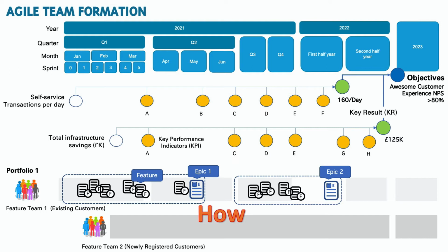With a draft feature roadmap defined, their attention then focuses on establishing a series of key performance indicators. These are shown as letters A to F against both key results. These are measurement milestones, which are used by the organization to track progress over the course of the 18 months. And where necessary, changes will be made to scope, milestones, and possible Agile team membership. The environment in which this tracking and assessment takes place is later introduced as the quarterly business performance review cycle. Simply put, the Agile teams determine how these key results will be achieved.